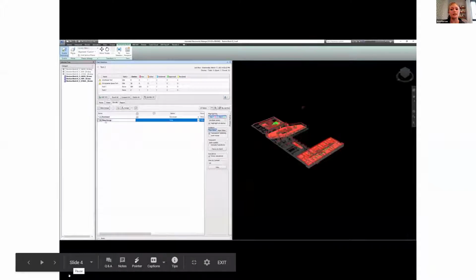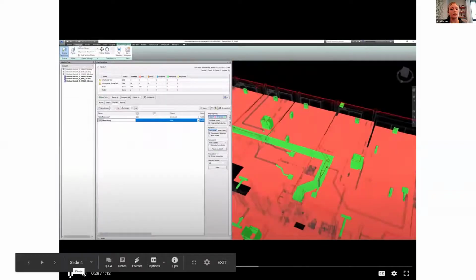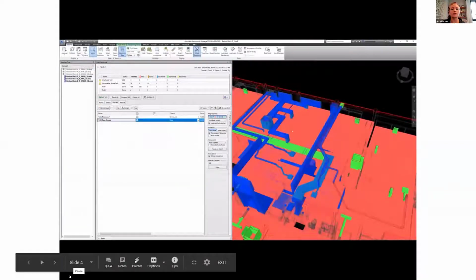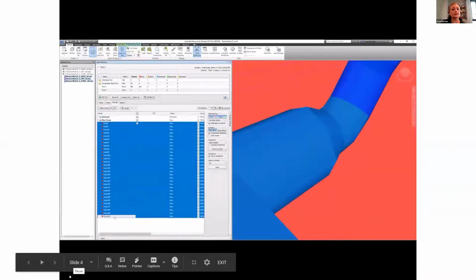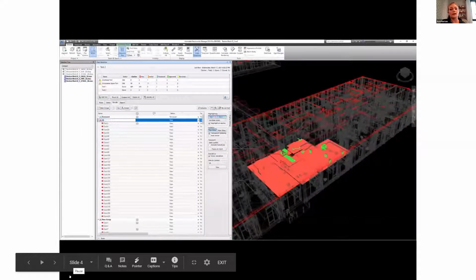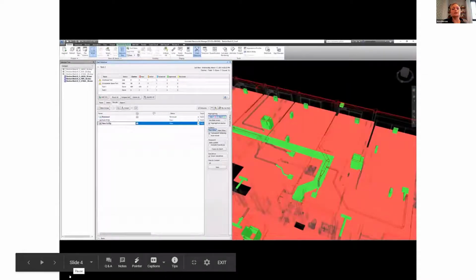And the way that we do this in design is really looking at program type, not necessarily system type like we would in construction. So in this particular case, with this model, we're looking at a unit because we really want to understand all of the major clashes just within the unit. In a large, let's say, hotel, we may be looking at a larger room. But what we do from there is use the inclusive tool to essentially grab all those clashes and then break them outside of the larger clash group. So this is a really quick way within just a few clicks to start isolating clashes without having to go through them individually. So we're really just looking at them by program.